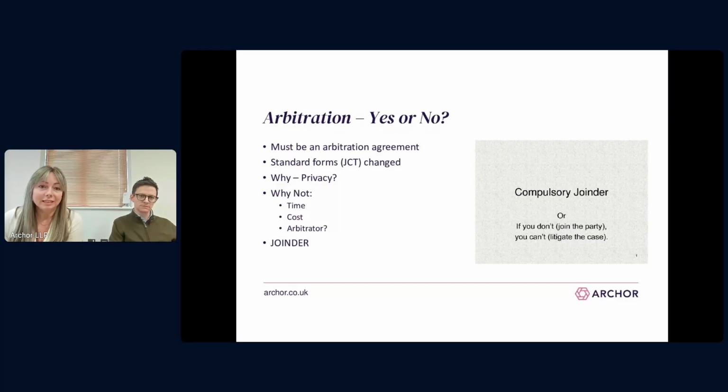Now, arguably, the cost and the time incurred in an arbitration is similar to what you'd incur in court proceedings. However, in arbitrations, you'll also have the cost of the arbitrators, and that's going to be significantly more than the court fees that you're going to pay in litigation. The pro to this, though, is that the parties can agree who the arbitrators are. So in court, you're just given a judge. You have no choice which judge you get. In arbitration, the parties can work together and get the right tribunal for them.